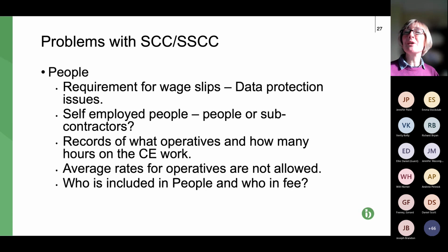That partly goes back to last week when we looked at the fact that irrespective of providing quotes for compensation event work, the case law shows that if you need to go to adjudication or court, you need to actually prove what your actual cost is rather than the forecast cost. So you're going to have to show how long somebody spent on that compensation event work and what exactly they were doing. So that's problematic in lots and lots of respects.